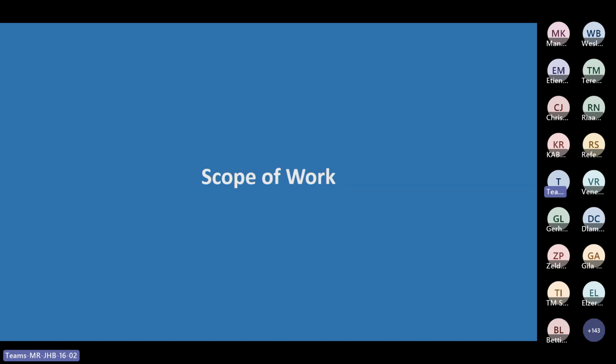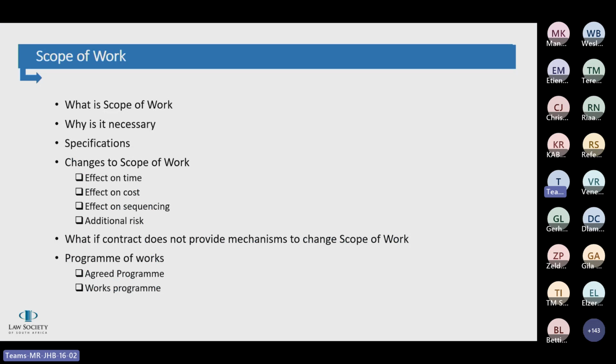The scope of work is probably the most important part of any construction contract, irrespective of what the type of work is. When we talk about a scope of work, what is really meant is that it should be a written document which outlines what activities will be included in your construction project. It'll form part of the contract document, and it'll describe the project's objectives, any milestones, deliverables, and outcomes. The scope of work document basically lists the construction obligations and the work activities that the contractor and the subcontractors, as well as any suppliers, are obliged to do in order to complete the project.